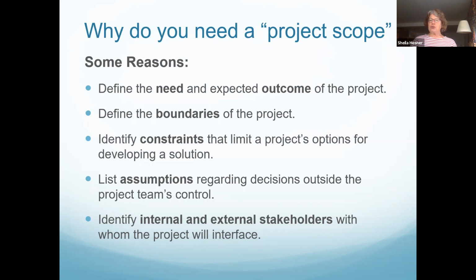And you can see on this slide some other reasons that you need a project scope. It helps you list things that will limit your project, like how much money do you have? It helps you list assumptions that you assume will be in place when you're doing a project. Like for us, an assumption will be good weather when we're building. It also helps you identify your stakeholders, the important people that you need to keep informed about your project.